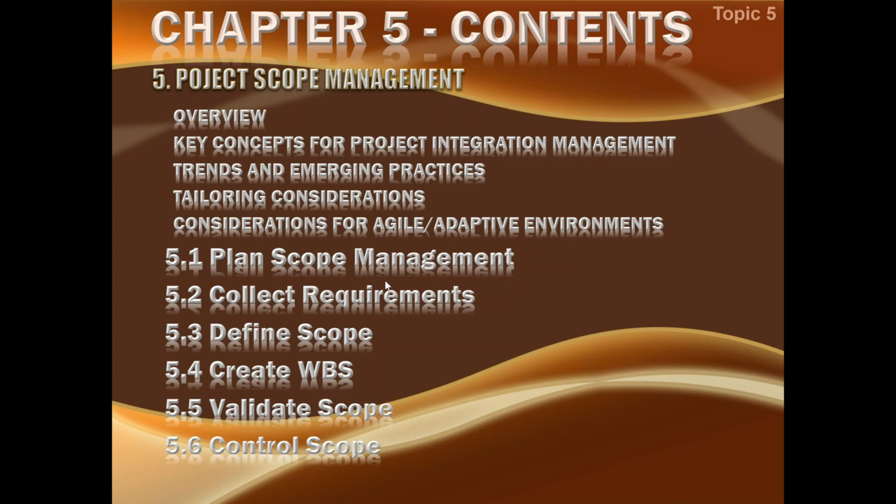Requirement is so sensitive an issue. Though it is covered under scope, management of requirements itself with the stakeholders is very heavy duty, and there is a lot of change going on in requirements. So a separate requirements management plan has to be created, and that plan is also created in the 5.1 process, which is plan scope management. So the result of plan scope management is not one but two management plans. The main one is the scope management plan, and the other one is the requirement management plan.